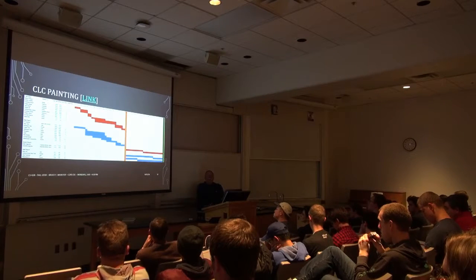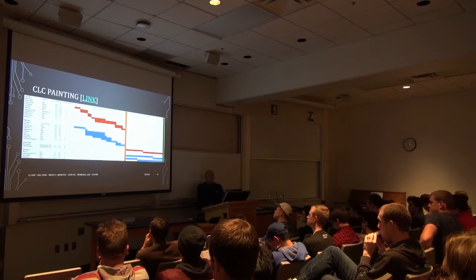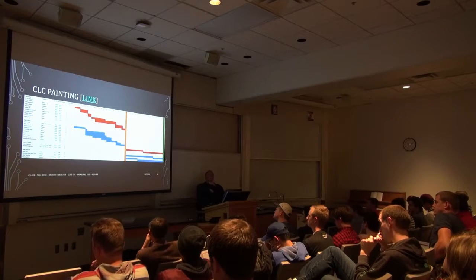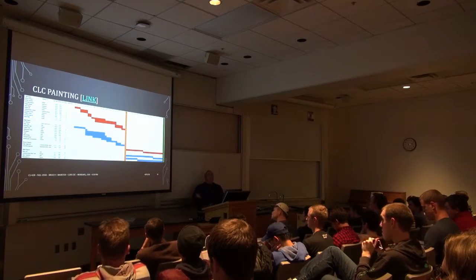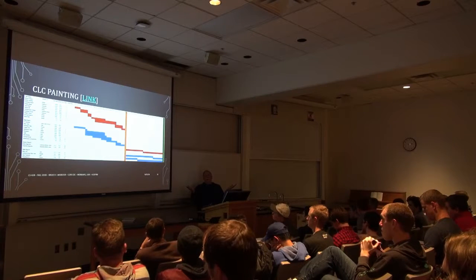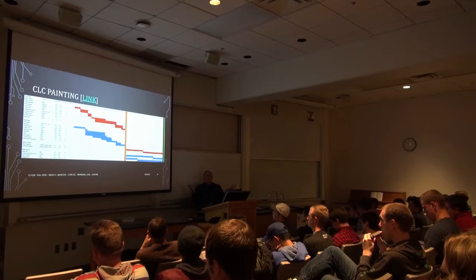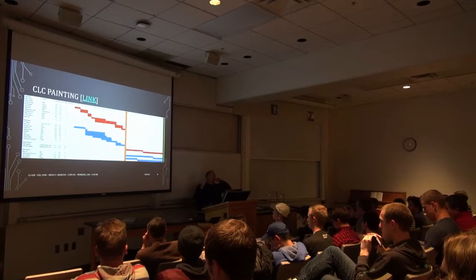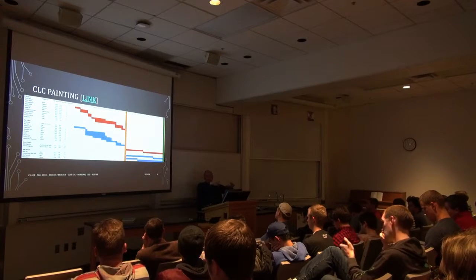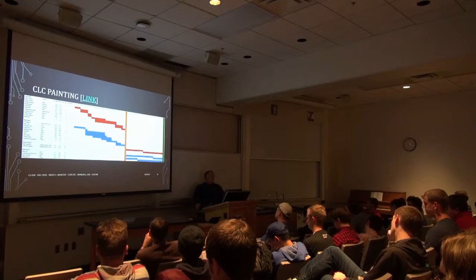We're going to see what we have done here, because by doing that, it tends to flush problems out of the underbrush. By having a milestone, by saying we're going to take a look at this, you have to do a team demo, division demo, company-wide demo on such and such a date.